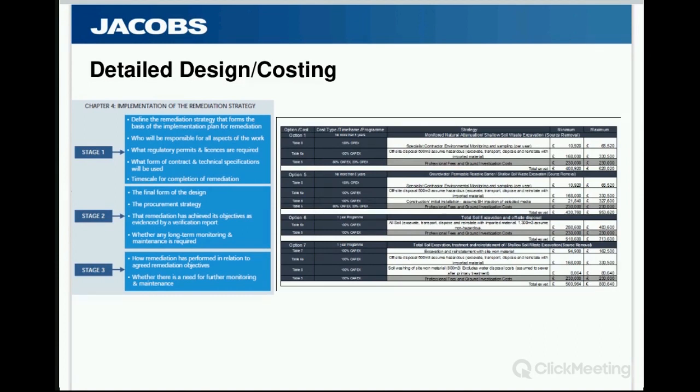It's quite a useful document, but now is a good time to start thinking about costings, now that you've got your strategy and all the design elements being implemented, rather than simply waiting for all the contractors to come back. Whilst the designs are progressing, it would be prudent to start forecasting elements that are required in the future. So this would be setting the remediation into the wider scheme, including any enabling works and suchlike, and permitting and the procurement strategy.